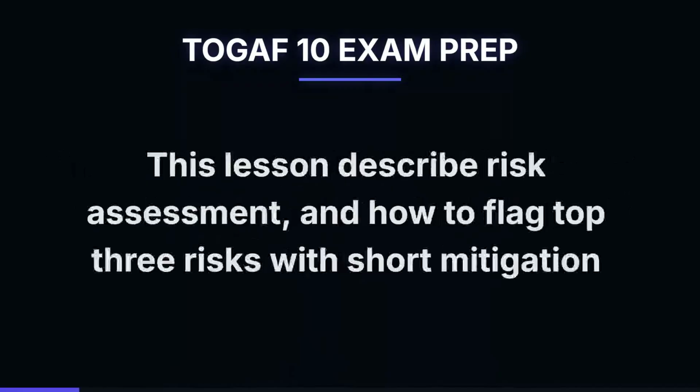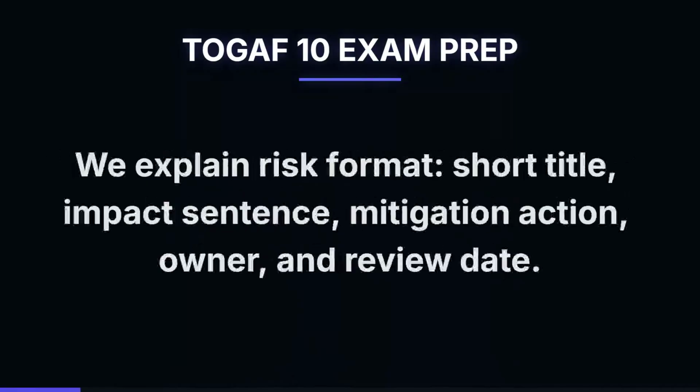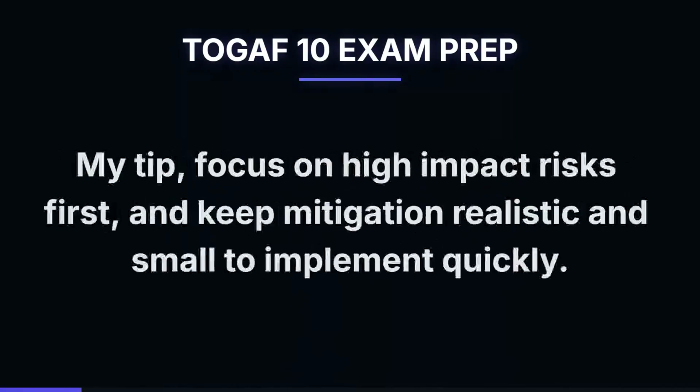This lesson describes risk assessment and how to flag the top 3 risks with short mitigation notes. We explain the risk format: short title, impact sentence, mitigation action, owner, and review date. My tip: focus on high-impact risks first and keep mitigation realistic and small to implement quickly.